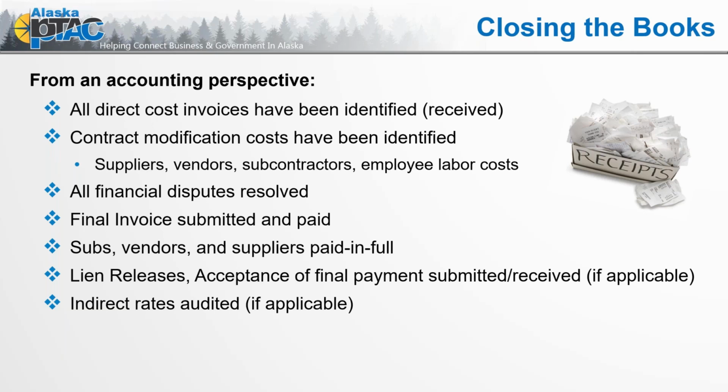And this is where, when we talk about who's invited to that closeout party, really, is there a good process within your company from the accounting perspective, the program manager, where you're sitting down and looking at, did you encapsulate everything? Were there unexpected expenses in the performance that may be reimbursable through a request to the contracting officer, through some sort of contract change action, or in the case of the pandemic, that there were costs incurred because suddenly we had modification requirements that said, hey, now you have to do all of this for health and safety. So have those costs really been identified, and have they been added to a final bill? Have you gone through and done what you needed to do to request those additional funds? And if you have, have you invoiced them?